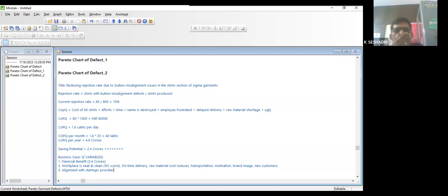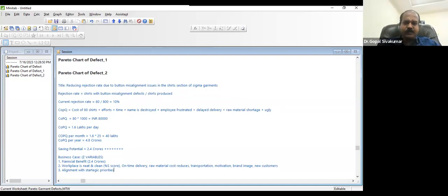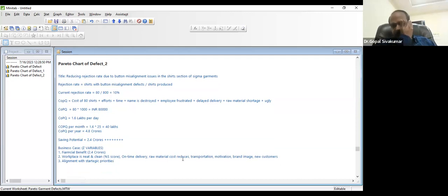It may be customer satisfaction, or it may be profitability, but the same word your top management should also be using. You have to link, then it is done. This is called a business case. See, if you know this, you can develop your first project charter, which is ready to be approved.